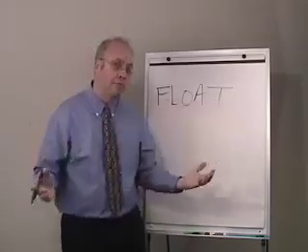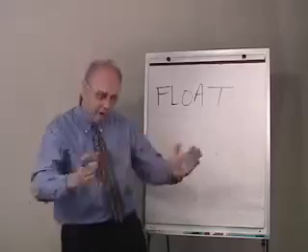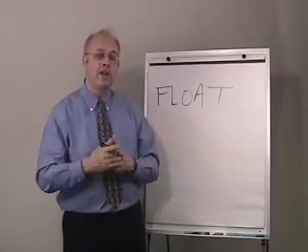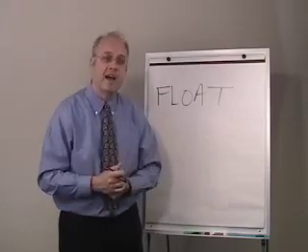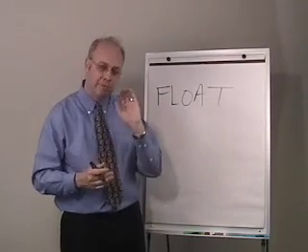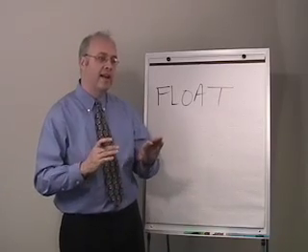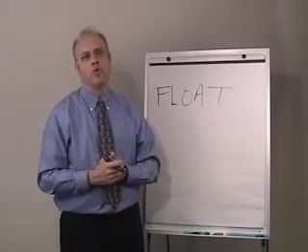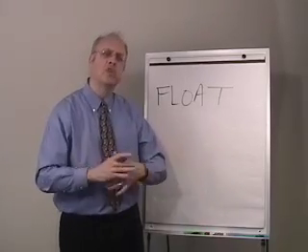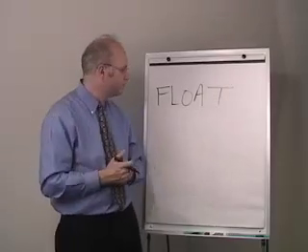But if you had float on pile driving such that you only had to mobilize one, and you could complete all the pile driving work within that period, you actually could complete the project in quite a bit less cost in the same time. The result being that we can use float to level our crew and equipment requirements, and ultimately, as a result, complete the work at lower cost, at least typically.